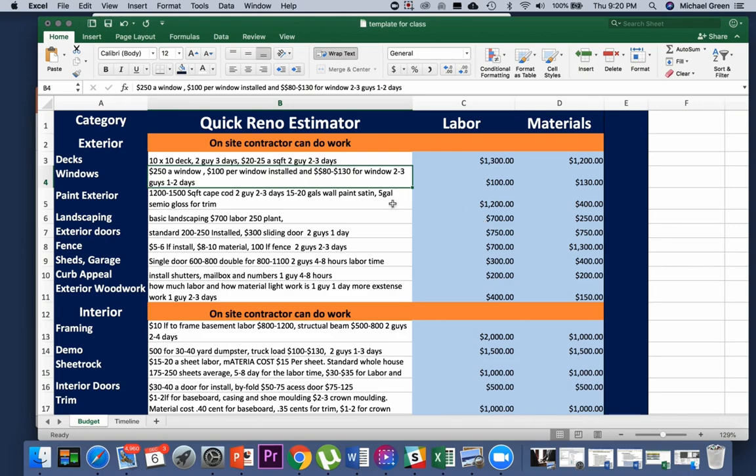And the fact that you're just paying attention to each of these items will give you a huge advantage over a lot of your competitors, because most of your competitors are not line iteming this out. They're getting a GC to give them an estimate, and the GC later on tells them they forgot 50 things and then gives them a bunch of change orders because they're like, oh, we found this piece of trim that was bad, we need another $20,000, and you just can't control your costs.